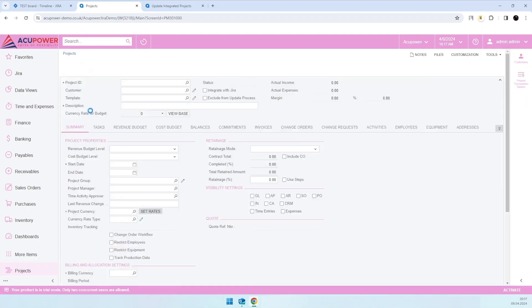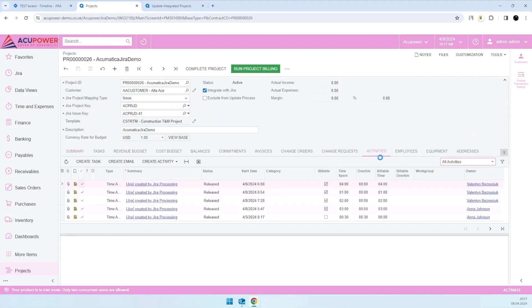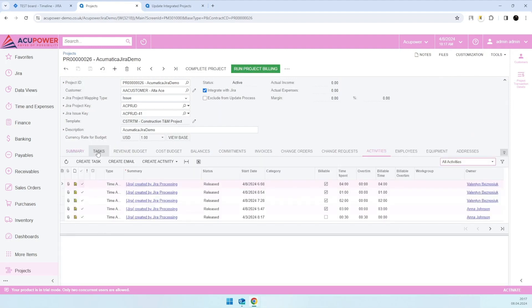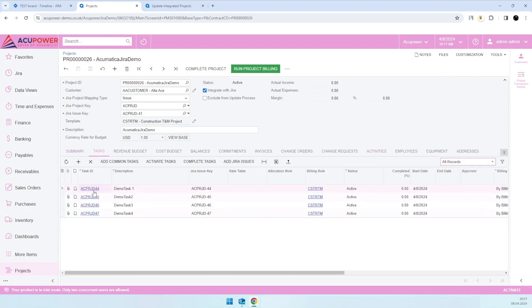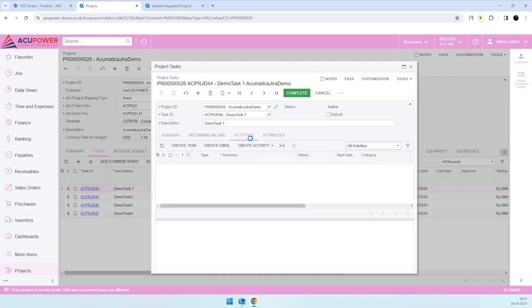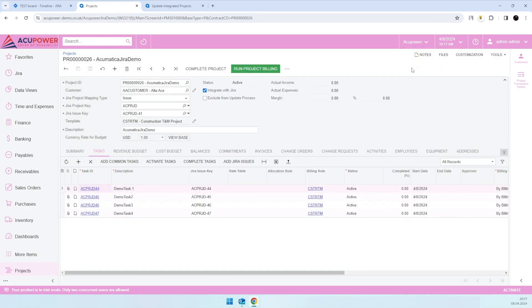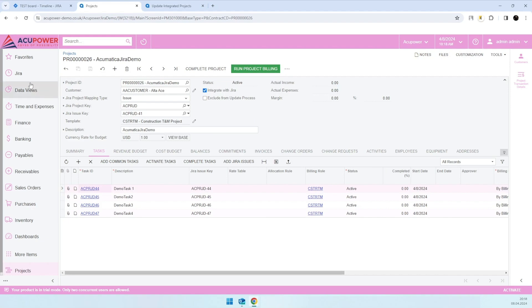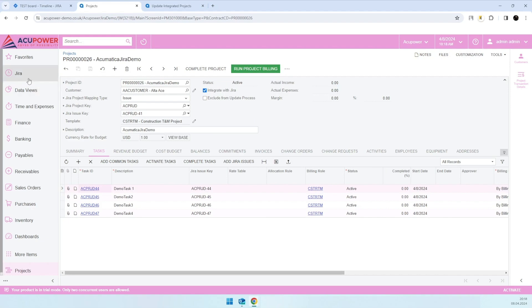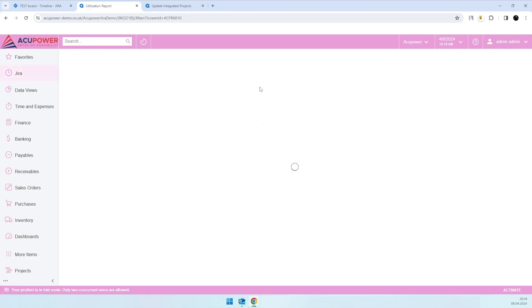you can simply see these time entries on the activities tab on the project, or filter it on the activities tab on the project tasks respectively. You can usually run project billing based on these time entries, as we usually do in Acumatica. The most interesting stage is our utilization report.